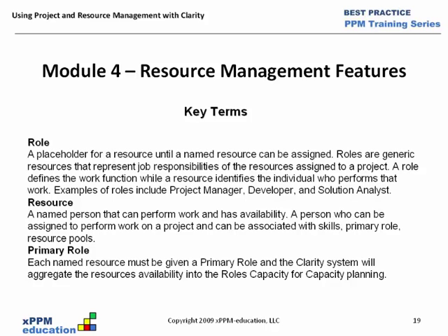What that means is that if we have 5 named resources in Clarity, each with a primary role, a project manager, then the Clarity system, when it looks at project manager and it looks at the capacity of the role for project management within Clarity, it would identify that it has a capacity of 5 because there are 5 named resources with that as its primary role.